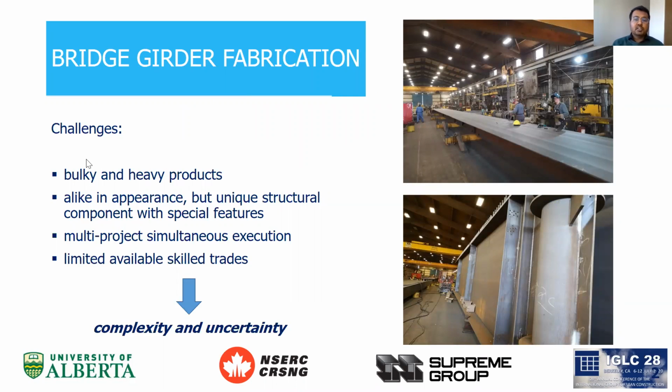Fabrication processes may be considered as one of the most complex undertakings in any industry. So here comes the question first: why is this so challenging and complicated? If we talk about shop scheduling in fabrication, unlike other industries where the products are identical, in fabrication shops the products are more unique and there are lots of variations among themselves. There is also little chance of automation and they are most prone to human error. Besides these, the resources are mostly shared among different activities, so there is a lot of scope for idling and waiting time for the workers.